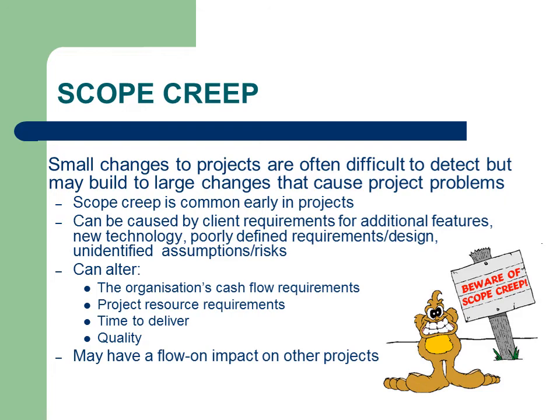Scope creep. Uncontrolled scope creep must be avoided at all costs. It can occur when there is no change control process or the change control procedures are not strictly adhered to. Scope creep will inevitably result in increased cost and time. In most projects, some changes to scope are inevitable and often necessary.